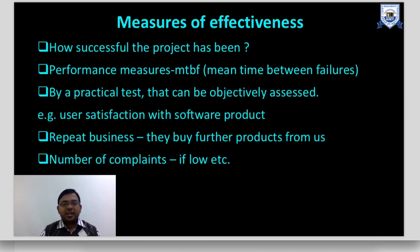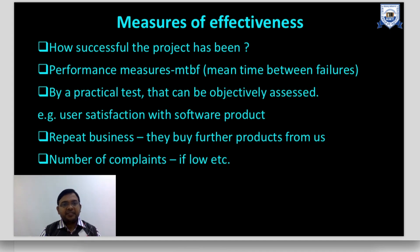How can you say your objective is achieved? Performance measures — for example, the failure rate or mean time between failures assessed through practical tests, user satisfaction, repeat business (whether the client gives you orders repeatedly), and the number of complaints. These are the measures by which you can check whether your project has been successfully achieved.